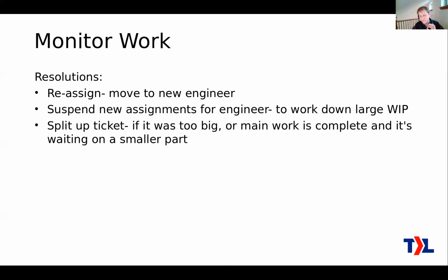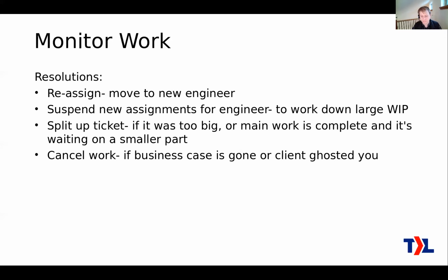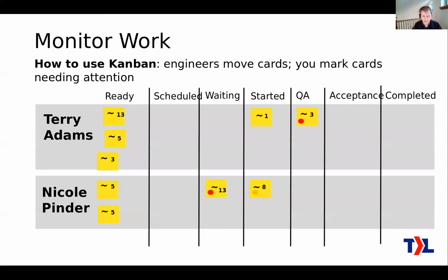Sometimes just close off that ticket, pull that smaller part of the work out of the big ticket, make it into its own ticket, and consider the original closed off. Then you can get that smaller part of the work back into the queue, so that somebody will do it when it's actually ready to be done. Things can also happen. Sometimes the business case for some work is just gone. Sometimes the clients just ignore you, and then you have to cancel it, and that's totally reasonable as well. Don't feel afraid to do that.